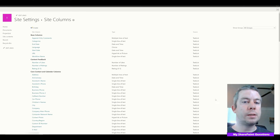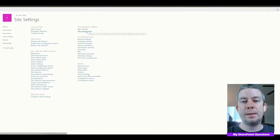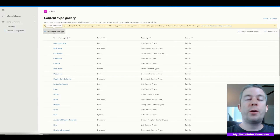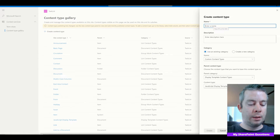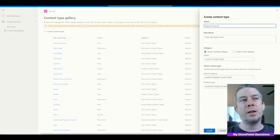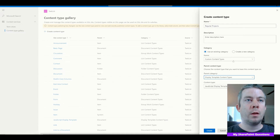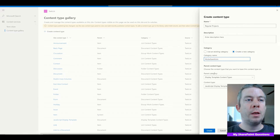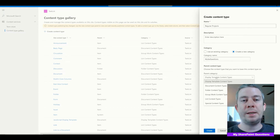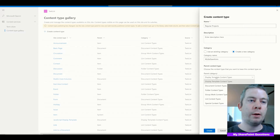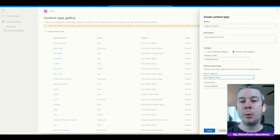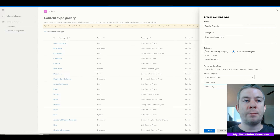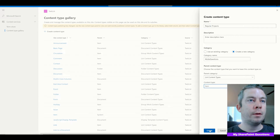We have now created our site columns. Let's go to Site Settings, then Site Content Types. We're going to create a new content type called Regular Projects. We'll create a new category called My SharePoint Questions. For the parent, we're going to do a List Content Type, and the type is going to be Item — so it's a list content type of content type Item. And we'll click Create.